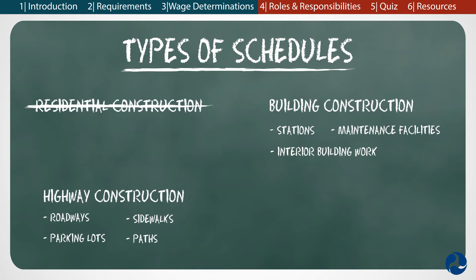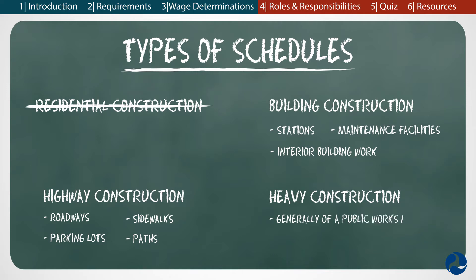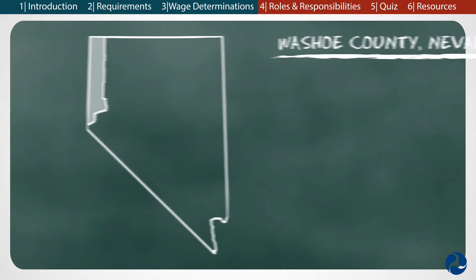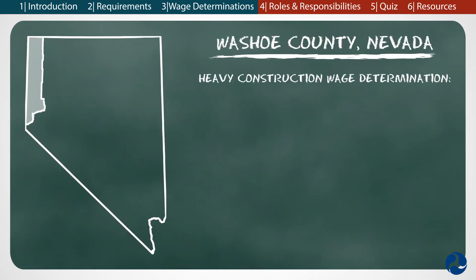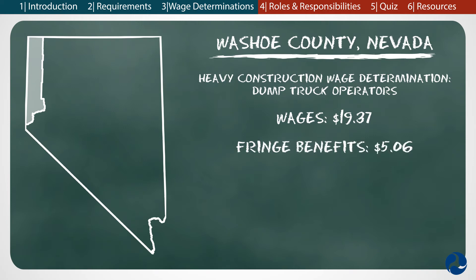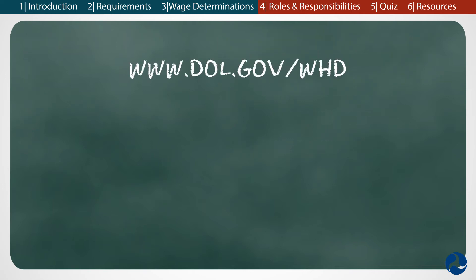An example would be a project to improve pedestrian access to and from a rail station. Finally, there is heavy construction, which is a catch-all category that includes projects generally of a public works nature. Most rail projects fall into this category. For example, according to the heavy construction wage determination for Washoe County, Nevada, dump truck operators must be paid at least $19.37 in wages and $5.06 in fringe benefits. If there is not a wage determination schedule listed for a particular job on a project, contact the project sponsor for more information.